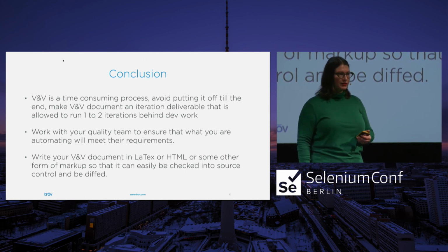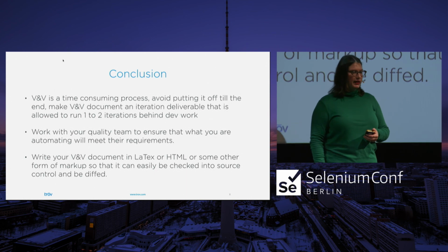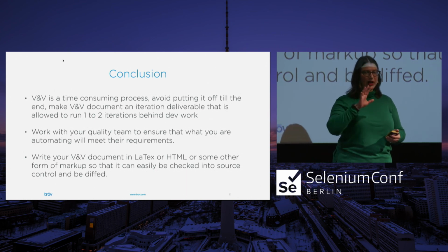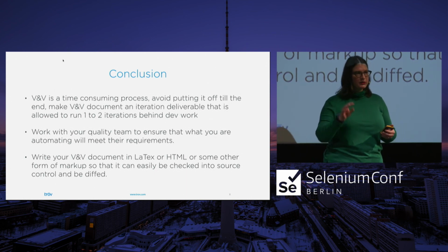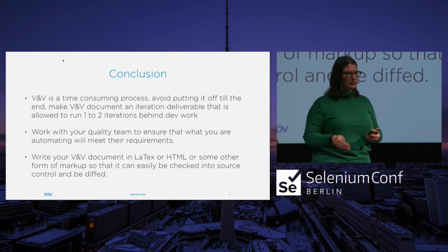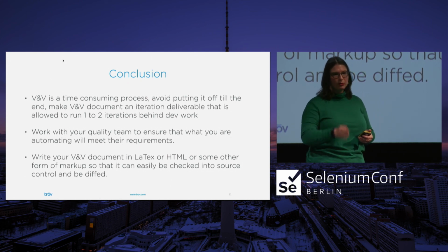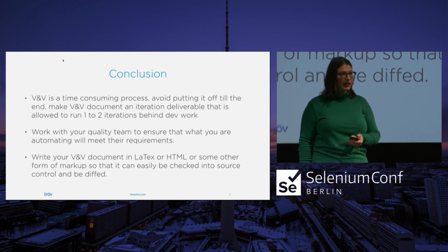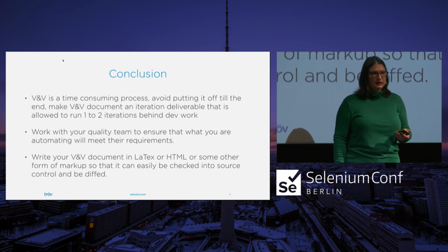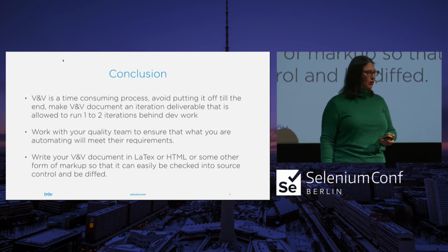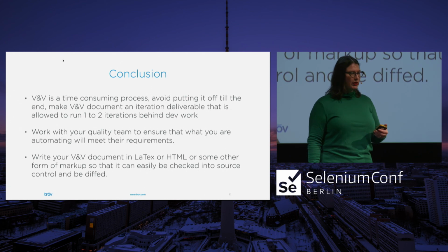And you have assigned deliverables, your own sprint, your own everything, your own Trello board. When we had our tasks on our Trello board, things would sit in the QA section because we just had one column. Our work wasn't fully reflected. This was a big problem when you're a consultant because they're wondering why they're spending so much money on QA, because they can't see the work that you're doing. So you need to make sure that you have documented what your process is.